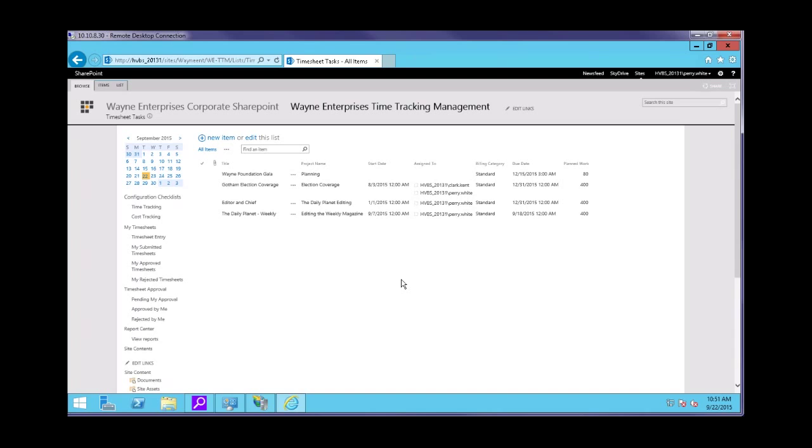There was a question about whether or not you can put a percentage of different work that they've done in different departments or different tasks. And yes, you have the option to key in an hour for each task that's on the field. And also you can change the cost code for each task as well to report back. However, you can't put an actual percentage. You would have to just put the hours. So if you did 25% of your 8-hour day, you would have to put in 2 hours. You can't put in 25%, per se. But yes, you can split up your daily work that way.